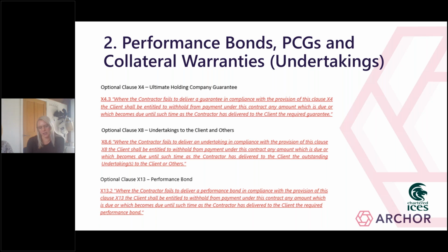So finally, looking at X13, if that applies, the contractor will be obliged to provide a performance bond, and that is to be in the form set out in the scope. Whilst this is not uncommon or a particularly new requirement, the bond market is incredibly difficult at the moment. So contractors need to ensure that if they are required to provide a bond, the surety providing the bond has been approved by the client ahead of entering into the contract, and the surety has agreed to provide the bond in the terms required under the contract.